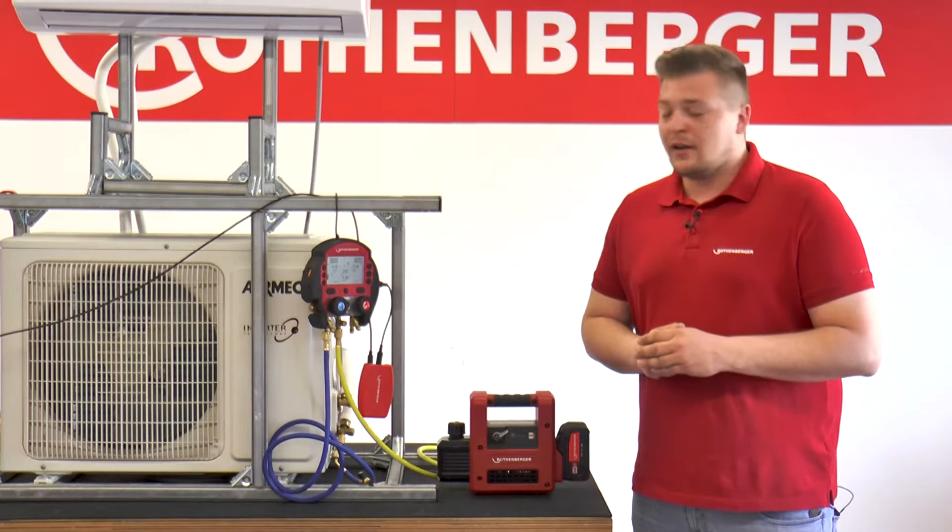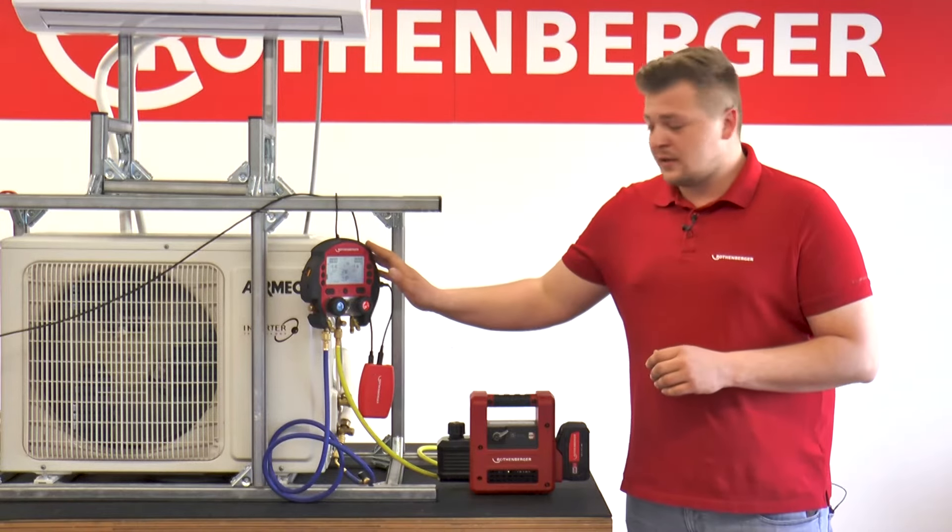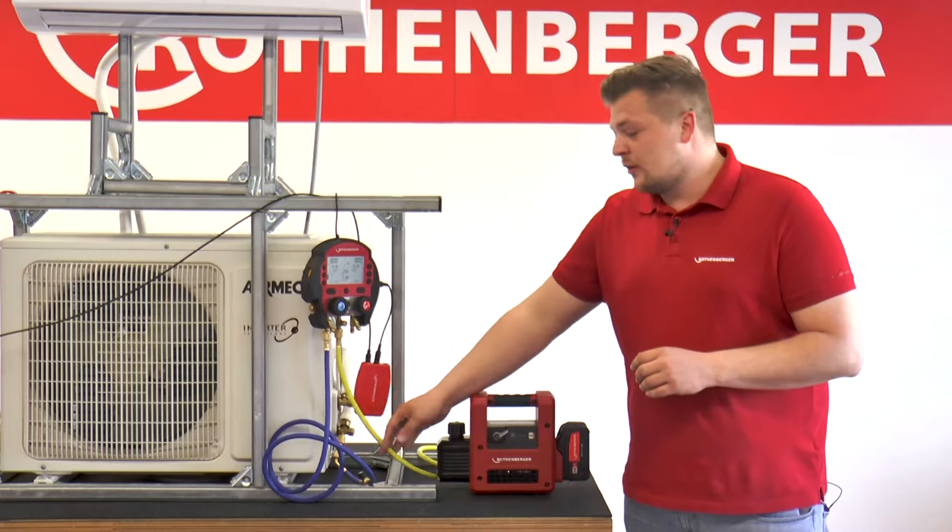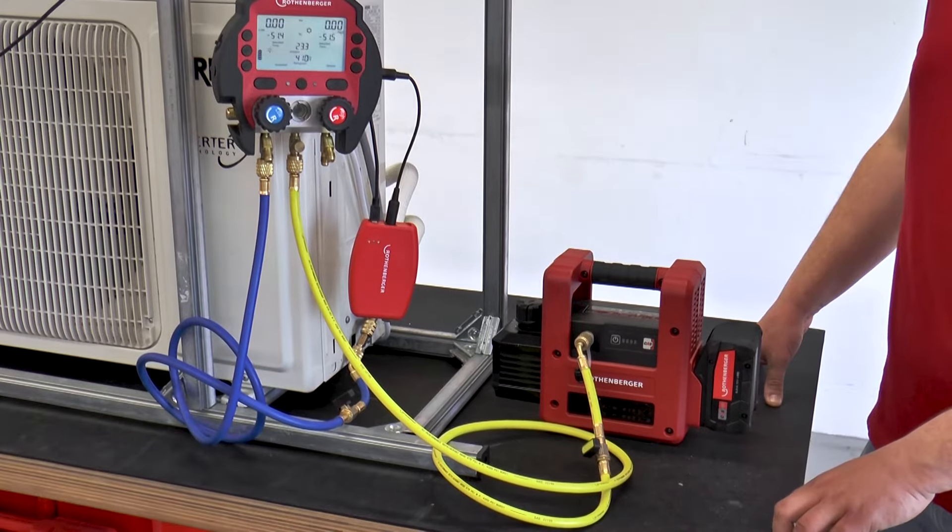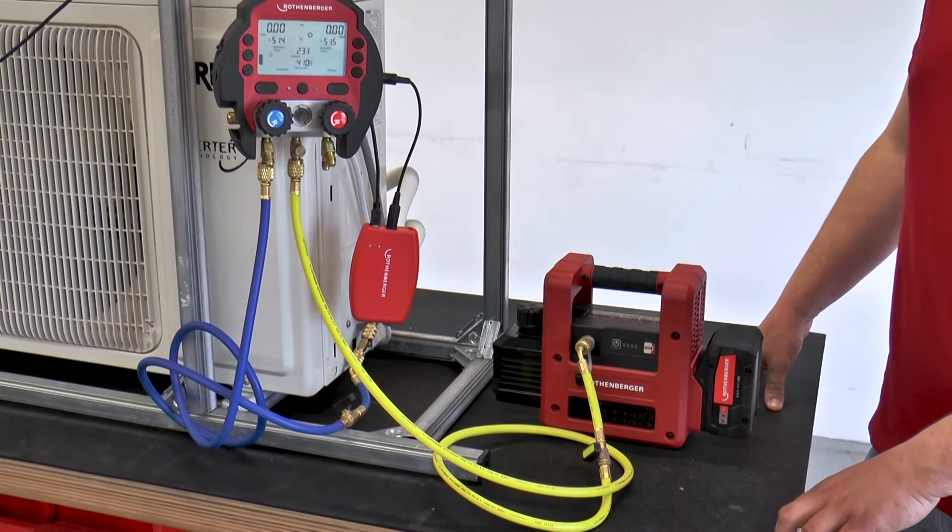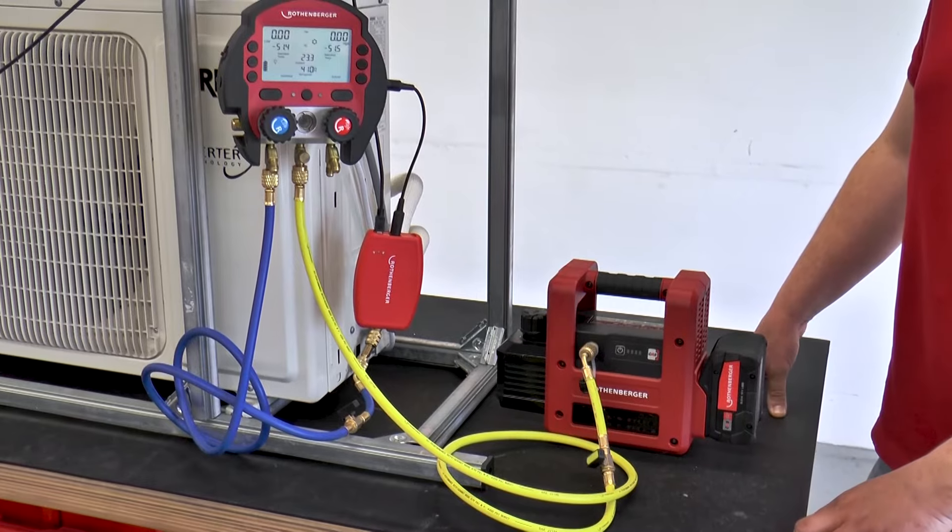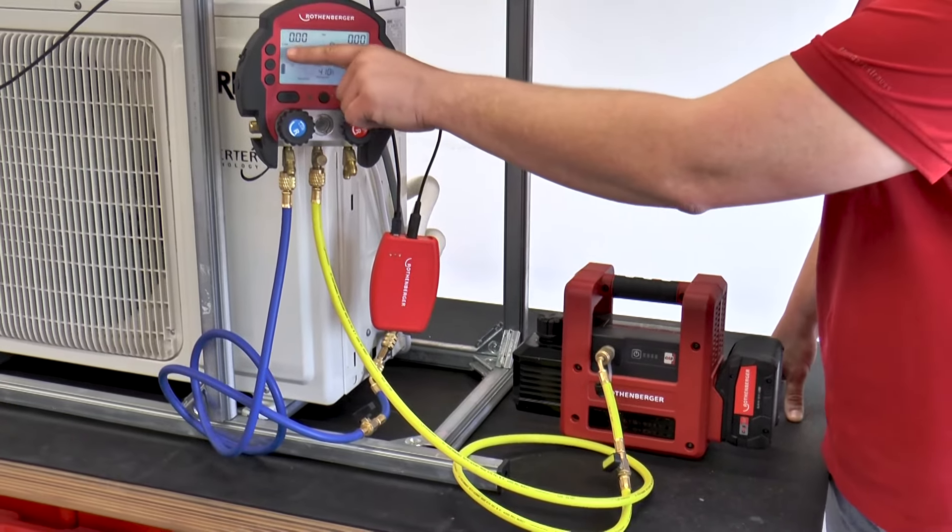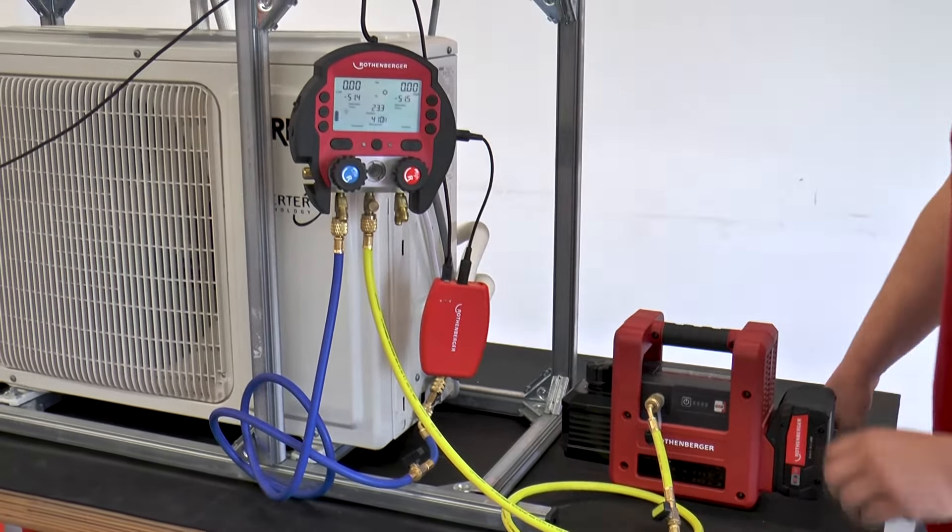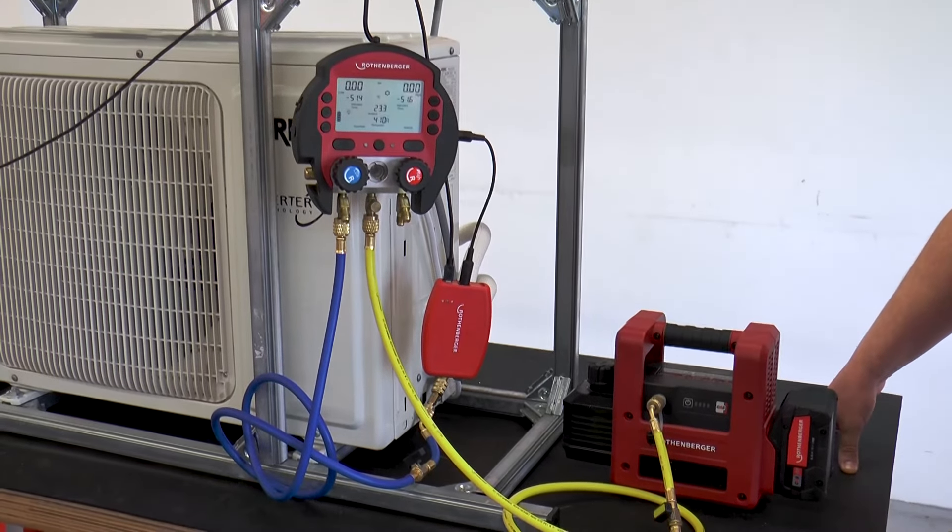In addition to the Rho AirVac, you also need the Rho Cool 600 and the appropriate refrigerant hoses to evacuate. After the leak test has been successfully completed after 60 minutes and the nitrogen has been removed from the system, the next step in the commissioning process is evacuation or vacuum extraction.